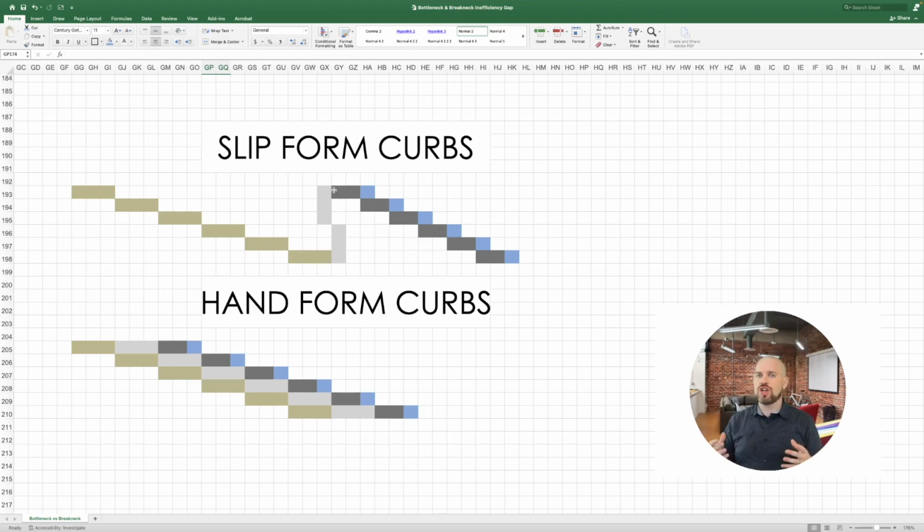Well, if we did larger chunks of paving and kept the paver machine there, there might be times that it might be able to flow, because we might run into issues or weather. And so they decided, let's actually just bring that paving in and we'll have these as our major mobilizations, but we have more if we need. And if we have any issues, we can eat into that and we can just flow. So that's what happened, and this is an actual replication of what we did in that plan that they ended up going and building out in the field.